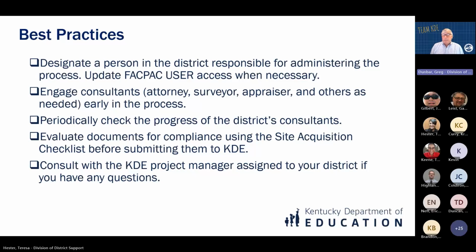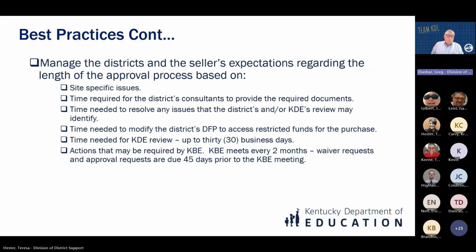The progress of the district's consultants should be periodically checked, and the documents evaluated for compliance using the site acquisition checklist before submitting them to us. If you have any questions about any of the requirements, you should consult with the project manager assigned to your district. Next slide, please.